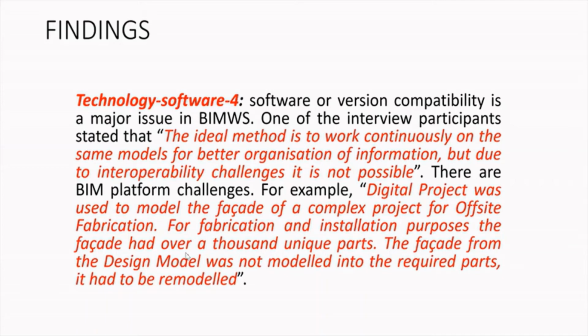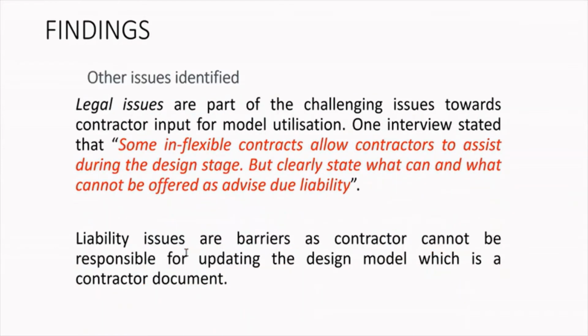Sometimes, for example, someone mentioned that they used Digital Project to model the facade of a complex project for offsite fabrication. For fabrication and installation purposes, the facade had over 1,000 unique parts, and the facade from the design model was not modeled into those required parts. Probably it had a very large part, and then it's left for the designers to go and find out how they're going to build it. So they have to use a certain software to do that. Probably they don't have the software to do that.